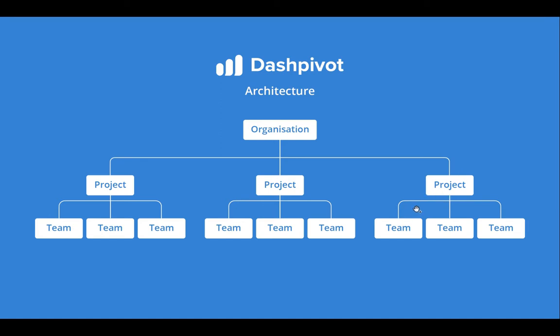Most projects will probably only need one team if you've got less than 20 people working on the job, otherwise we recommend breaking the project into teams by geography. This might be a north team and a south team or by crew, so it might be an early works team, a drainage team and an earthworks team for example.